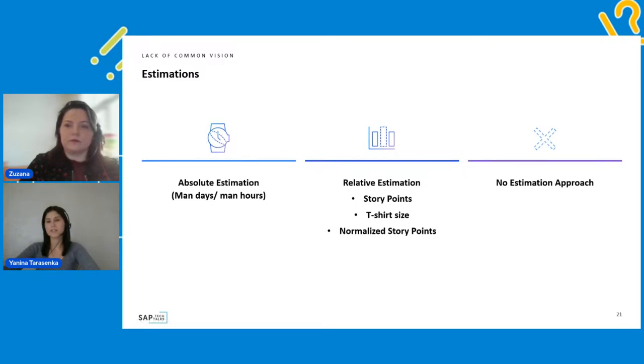But we need to mention that such an approach would be great for mature teams with stable deliveries, with great experience and great knowledge of the application. Moreover, the items that you, let's say, don't estimate should be of the same size or pretty much the same size.